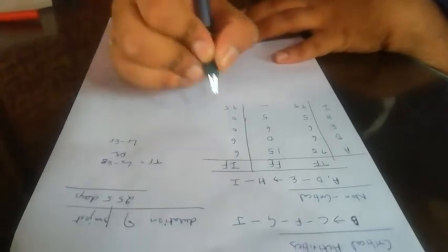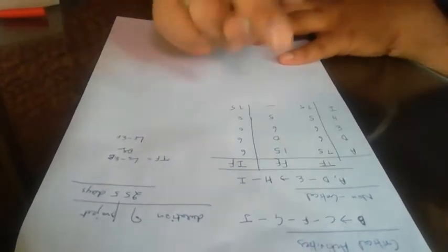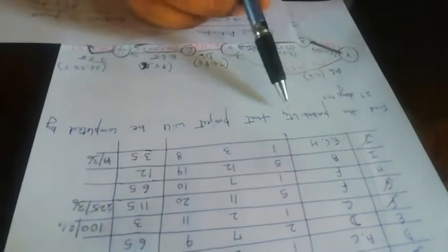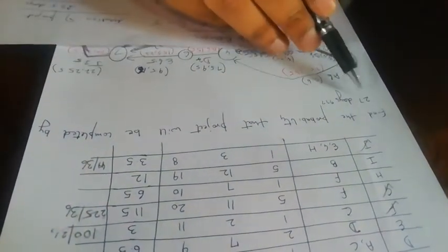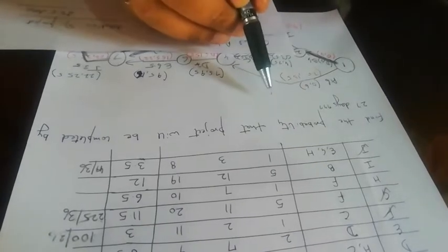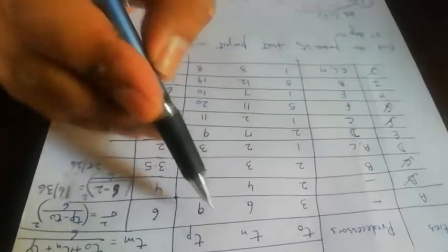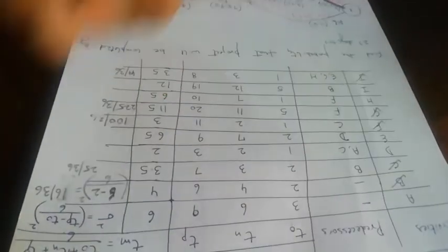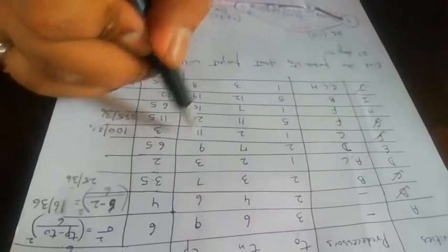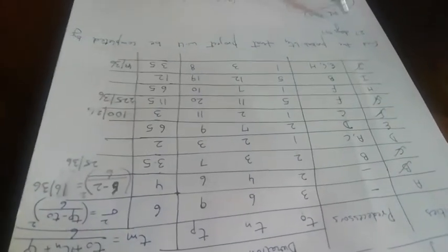So our next part comes, it is PERT. It is only possible in case of PERT, which is like in the given question, we have to find the probability that the project will be completed by 27 days. Because we have 3 estimates, it is not possible that each activity will be completed at the exact duration. Some activity may take longer, some may take shorter time and so on. So now we want to calculate that the project will be completed by 27 days. So here we apply the concept of normal distribution.